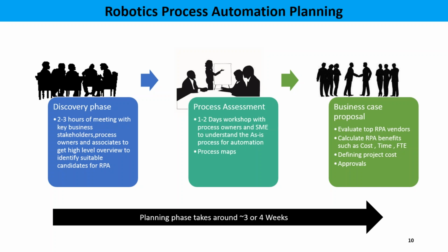In this process assessment, in the first phase we get the high-level overview, then we go inside and do a deep dive to understand what the process is all about. So it is a 1 to 2 days workshop with the process owners and SMEs, to learn what the ground-level work is and who the people working on the ground level are.